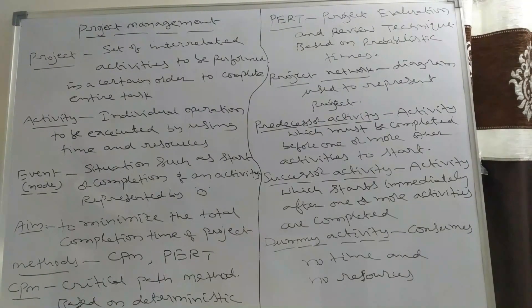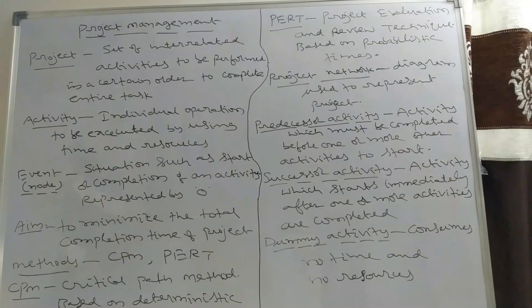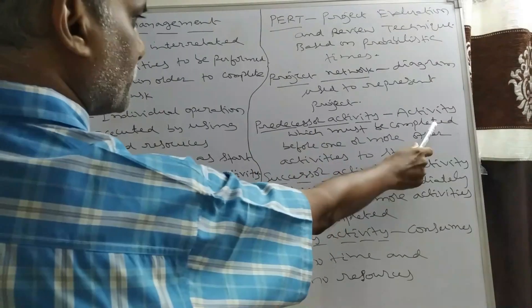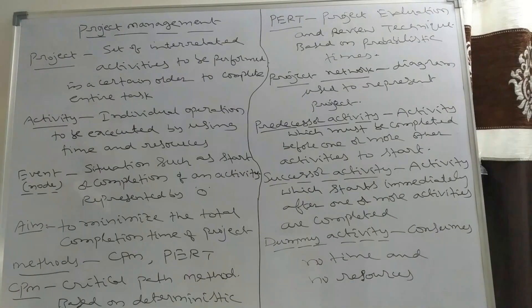In a network, we have different types of activities. For example, in the construction of a building, when we start construction of the foundation, it begins only after getting plan approval and making the site ready. So plan approval and site preparation are predecessor activities of the foundation activity. A predecessor activity is one which must be completed before one or more other activities can start.